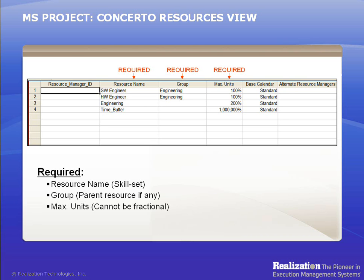As an example, suppose there are two units, or 200% of engineering resources available. Under this, we have Software Engineer with one unit and Hardware Engineer with one unit — three different types of resources. Why do we construct resource sheets with hierarchies like this? Consider a situation where there is an engineering task that can be performed by either a Software or Hardware Engineer. In this case, the task can be assigned to engineering. This increases pooling opportunities for the Software or Hardware Engineer when there are conflicting tasks, and it allows tasks to be performed in parallel.